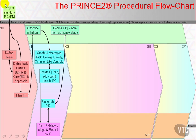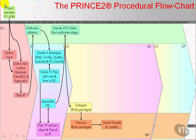When we get a positive result from the Authorise a Stage decision, this authorises the Project Manager to start the dialogue that delegates work packages to team members or team managers, who then receive the work package. The team member then conducts the technical work to create the results to quality specification, and also to create progress reports called checkpoint reports, described in Appendix A at Template Number 3.